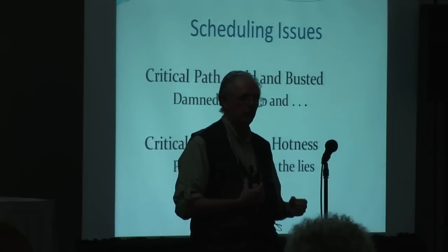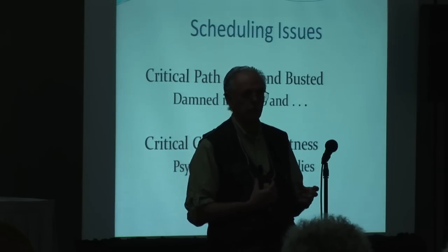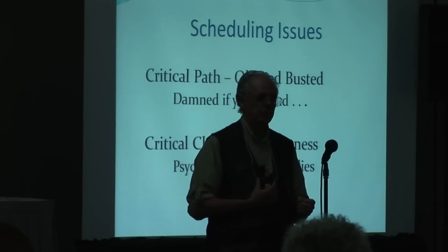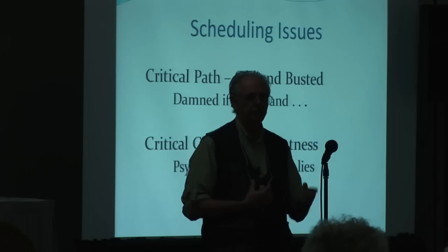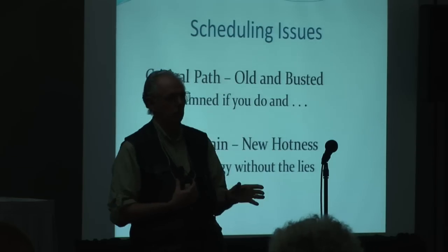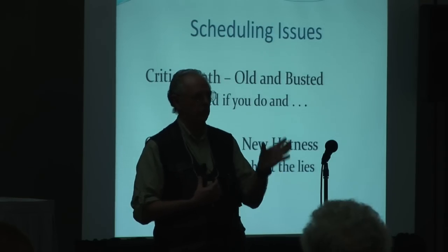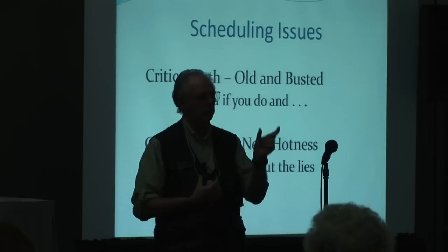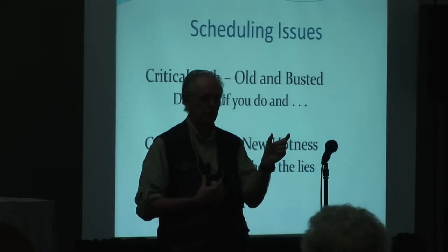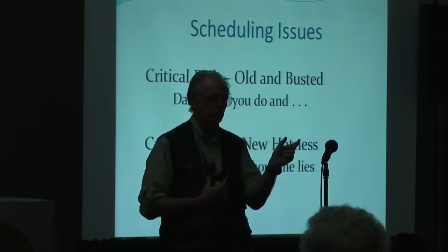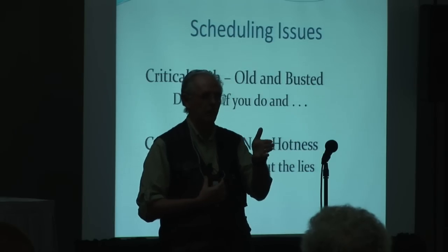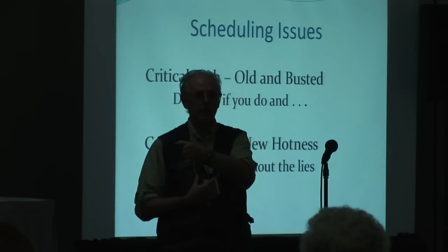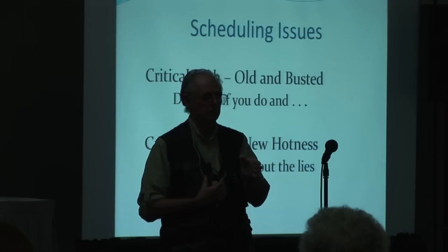It turns out the critical chain approach, which I'll describe in just a minute, fixes that problem, and you don't have to lie to anybody. How critical chain works is you do the same thing you did before. You have these tasks. But instead of putting the pad in, you say, here's how long I expect it to take. Not too conservative, just somewhere in the Goldilocks zone, so to speak. So you put all these tasks in at realistic times.